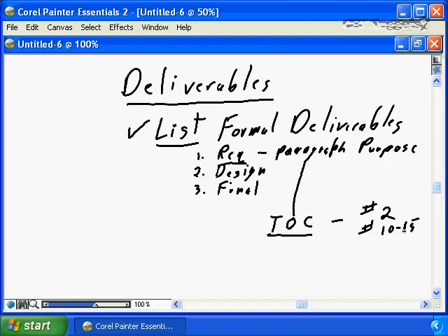If in section 2, the evaluation of the current situation, you're telling the business it's going to be 10 to 15 pages long, that in my mind says it's a fairly high-level review of the current situation. If you can summarize the current situation of a business in 10 to 15 pages, you are certainly doing a summary, where if the business was expecting a detailed evaluation of each and every function and each and every process in the current situation, their expectation would be that section of the deliverable would be 75 to 90 pages long.